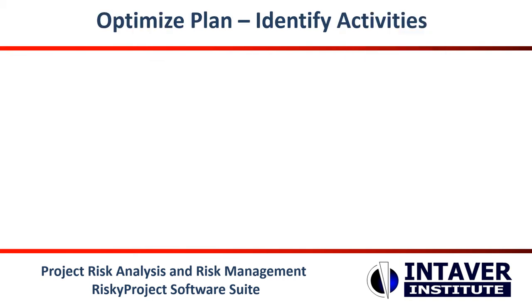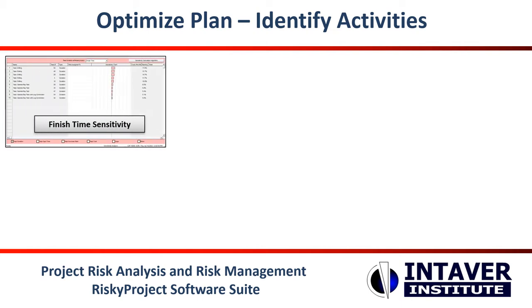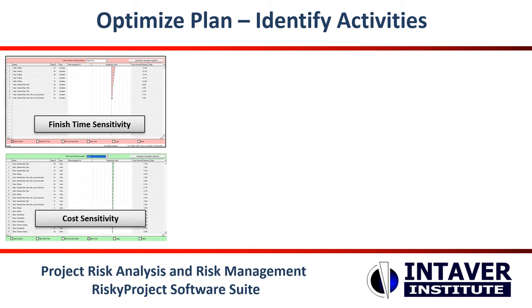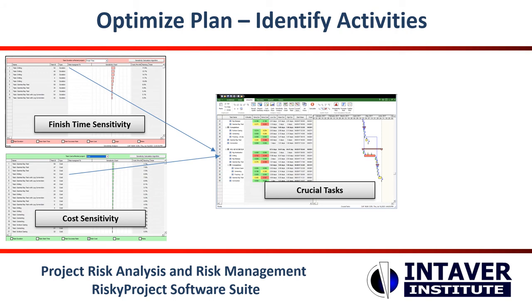The next step is to optimize your plan. Further optimization of the schedule can be performed using sensitivity analysis. There are two main visualizations that should guide these efforts: sensitivity and crucial tasks. The sensitivity analysis for cost, finish time, and other project parameters shows which activity or cost has the most impact on the project parameter — for example, how much the finish time of an activity is impacting the finish time of the project. The crucial task view presents similar information in a Gantt chart view, showing the sensitivity ranking of an activity for cost and schedule.